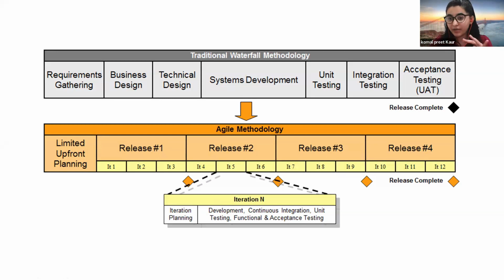Fourth main priority can be a payment feature. You have selected your food, location is done. Now you're moving forward to adding that food to the cart and going for the payment. So these can be the main 4 to 5 features that I want to build in iteration 1, so that I can focus on them. Once I have worked on these 5 features, and it's designed, deployed, tested, and everything is done, then that will be our first sprint. Then next sprint, we can cover more features that we have left, right? So in this way, we are giving the overall work in small phases.